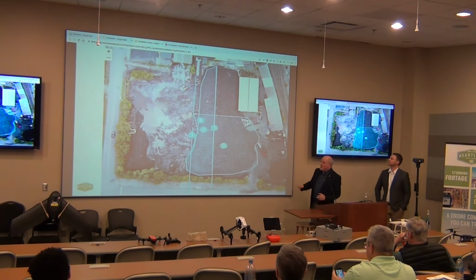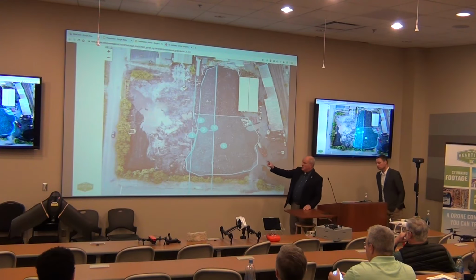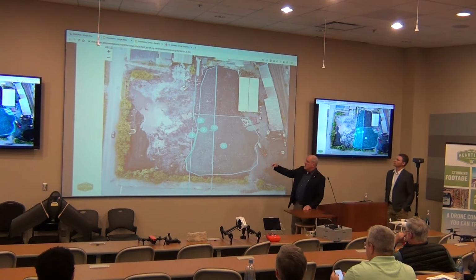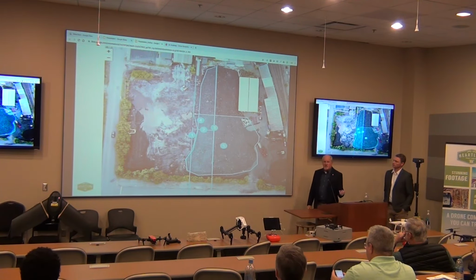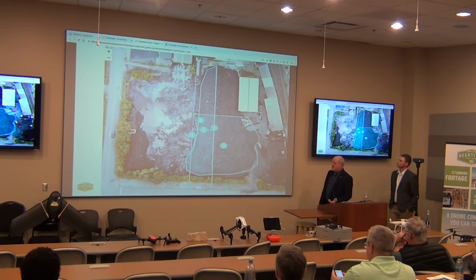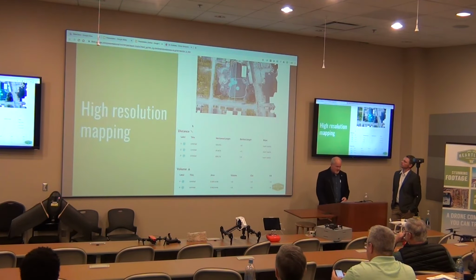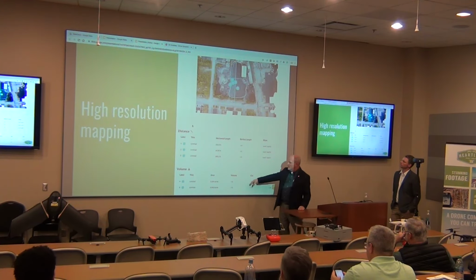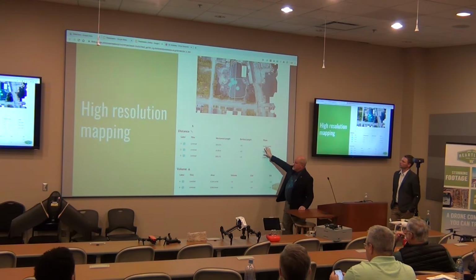All right. So we were able to superimpose the buffer zone and do a quick calculation on cut and fill, and we were able to tell the contractor you need to move X number of cubic yards of this material to get back to that safe buffer zone. Here is an example. I don't have these volumes actually populated, but this is what we call an annotation tabulation.